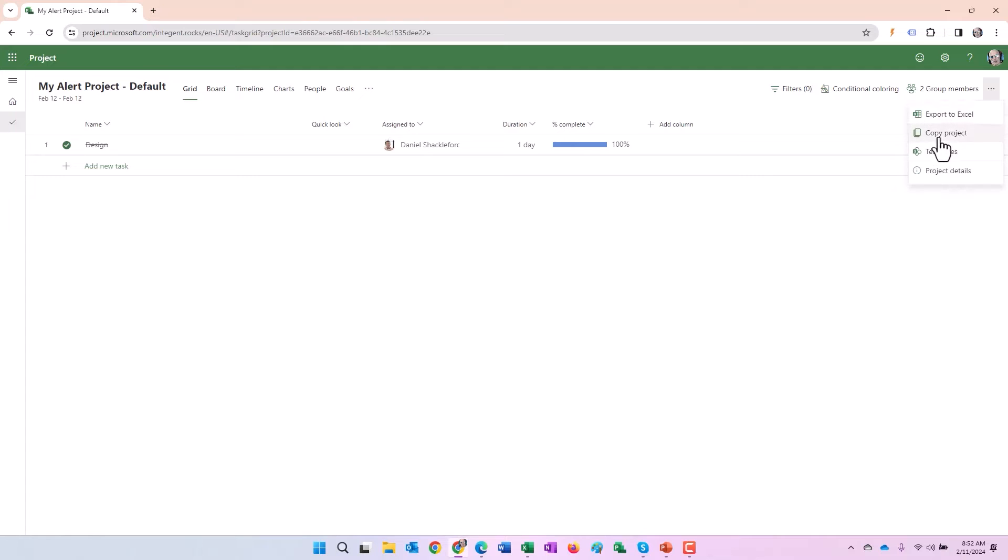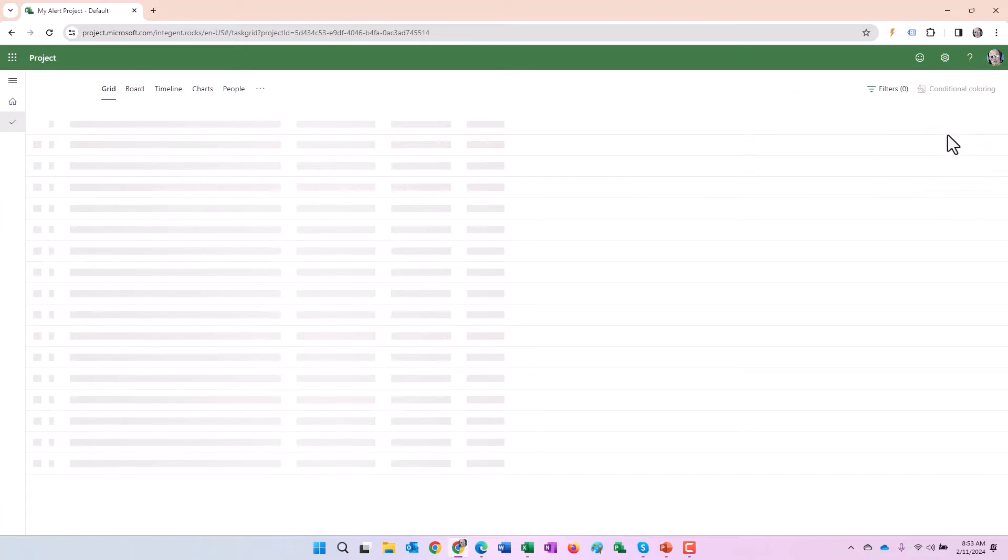If I select that, you'll notice that the function here is copy project. When you do copy the project, it does not copy over all the assignments and so forth. But if you want to, you can recreate those assignments. And you can also copy over the group, the O365 group and all those people that are members of the group as well to simplify that process. Let's go ahead and copy this real briefly.